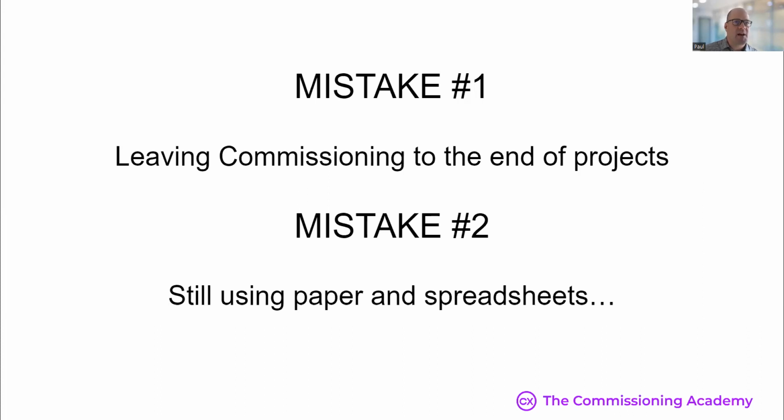Everything there: pass, NA, fail, measure values, confirm pass, fail criteria. And you know right away, pass, pass, pass, pass. Anything that fails, punch list items are raised. They're all tracked in software. This is all done on your laptop, on your handheld device, on your phone, on a tablet, and you get that real-time integration of data being fed into the system. It significantly simplifies the processes.